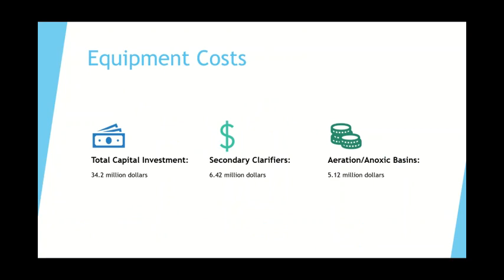Equipment costs were determined from a cost report from the Northwest plant. The report includes data about the original costs of the equipment, along with the life of the equipment, installation year, last inspection date, and the replacement cost. When determining the numbers associated with the two major units, the replacement cost was used in the calculations if the piece of equipment was past its service life.